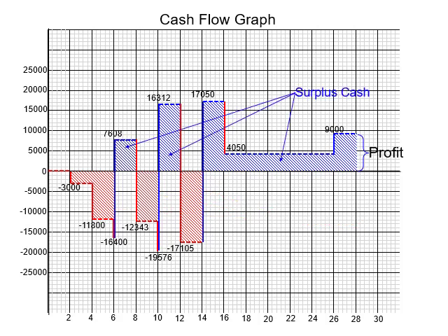The blue shaded areas indicate the periods and amounts of positive bank balances, also referred to as surplus cash. Should the contractor start the project with a 0 Rand bank balance, the graph reveals the cash flow position of the contractor, at various stages of the project, relative to the maximum negative cash requirement, or overdraft needed for the project, indicated as minus 19,576 Rand. And the maximum positive cash available, or positive bank balance to the contractor, is indicated as 17,050 Rand.